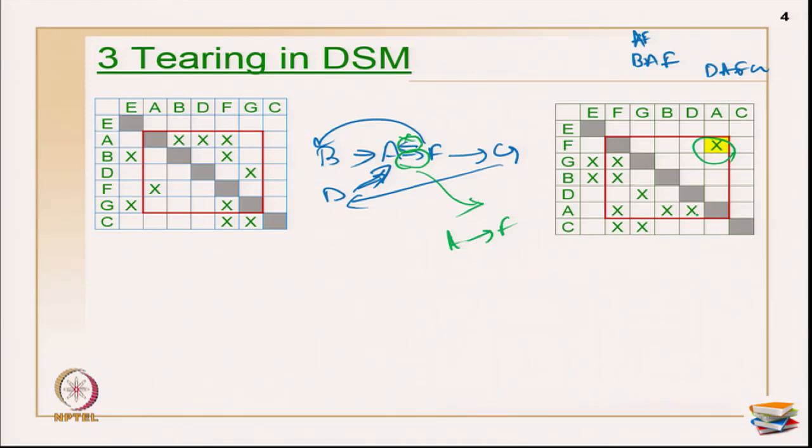So, this is one way of evaluation, because when I opened up the whole graphical representation, I saw this one relationship A to F is actually causing three loops to exist. If I break this one link from A to F, automatically all three loops are erased. So I have chosen one with the help of my graphical evaluation. There are other methods also available for the same.